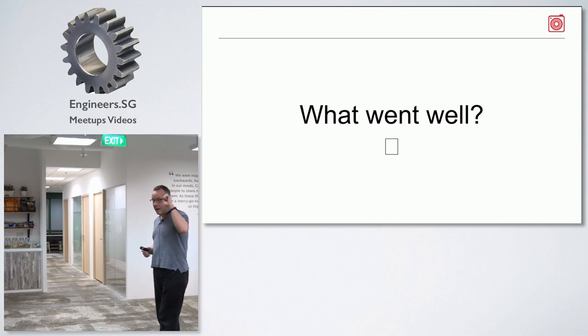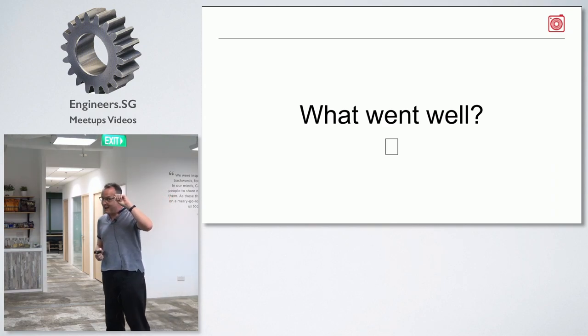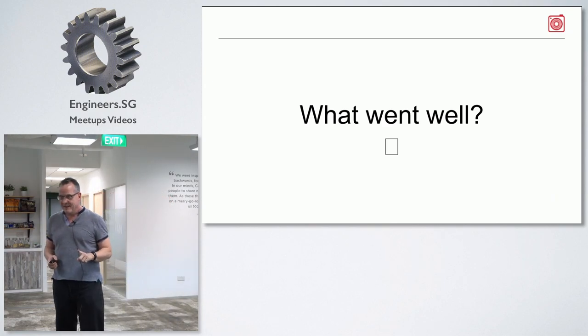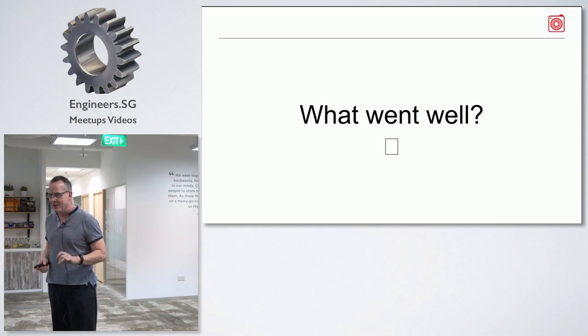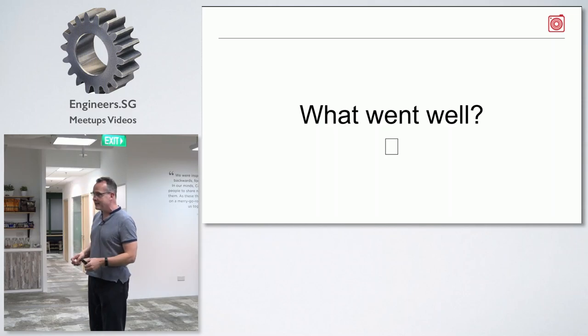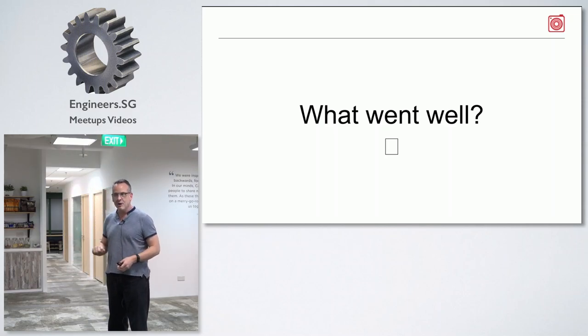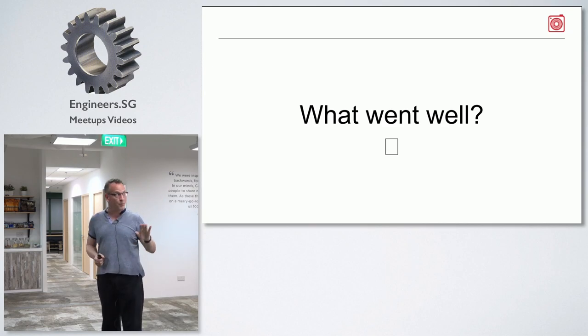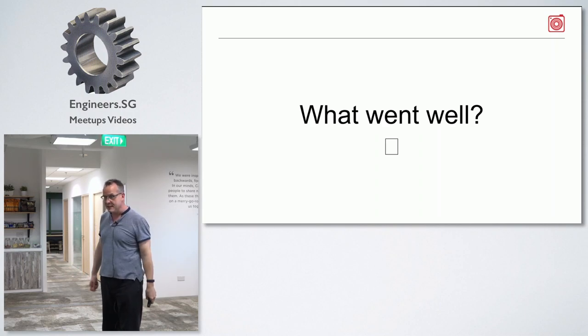I think you need to think about bias and cognitive bias and how it comes into play, how people look for confirmation, how people anchor on things. So one of the best ways to do this is have each person sit for 5 minutes and write little post-its. And then go up and put them on the post-it board, the first one being what went well. So put your post-its there.